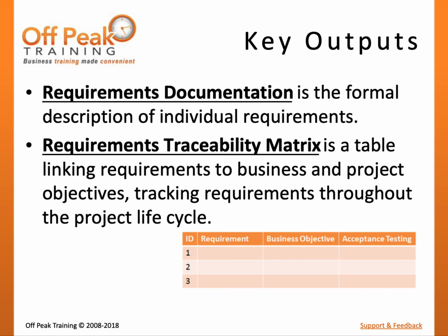Secondly, the requirements traceability matrix is a table linking deliverable requirements to the originating business needs through the final user acceptance testing. This structure helps to ensure that documented requirements are delivered at the end of the project and helps manage changes to product scope.